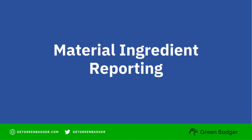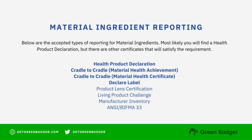Next, we'll take a look at material ingredient reporting. Ingredient reports tell us what a product is made of. As you can see in this slide, there are many certifications that meet LEED requirements, but most common by far are health product declarations, cradle-to-cradle, and declare labels.